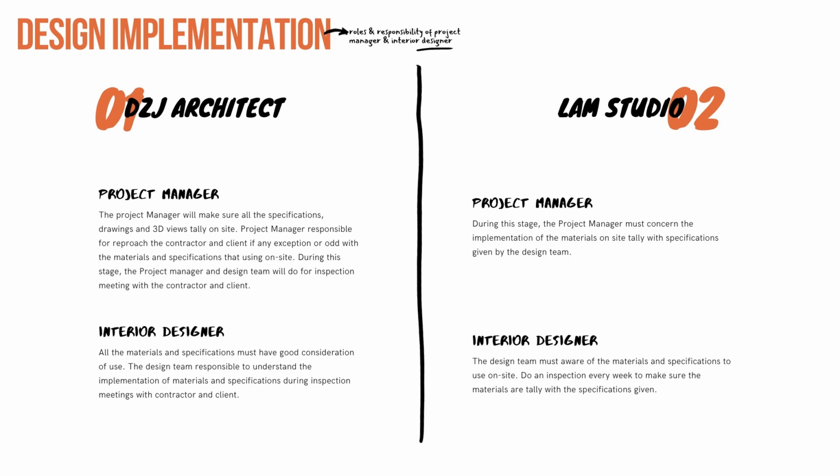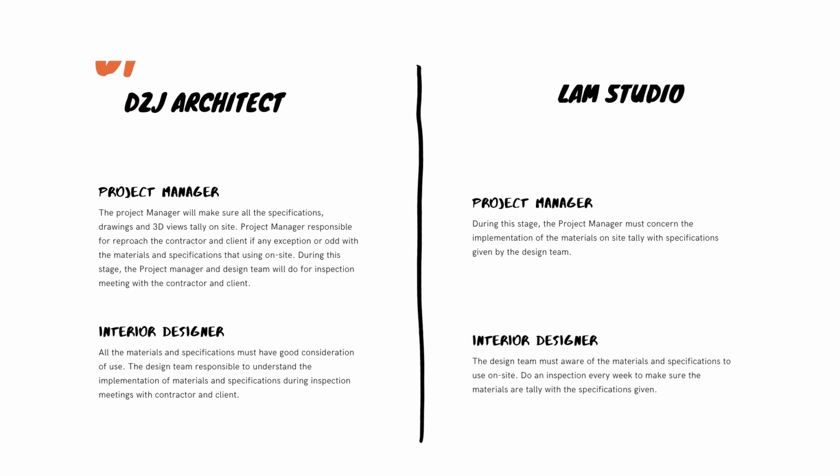For interior designer, all the materials and specification must have good consideration of use. The design team responsible to understand the implementation of materials and specification during inspection meeting with the contractor and the client. For IM Studio, project manager must concern the implementation of the material on site, tally with specification given by the design team. For interior design, team must aware of the materials and specification to use on site. Do an inspection every week to make sure the materials are tally with the specification given.